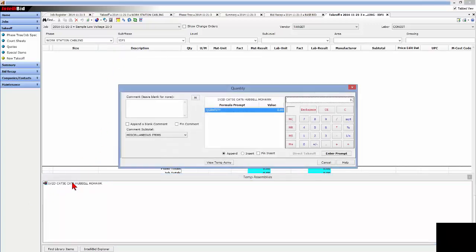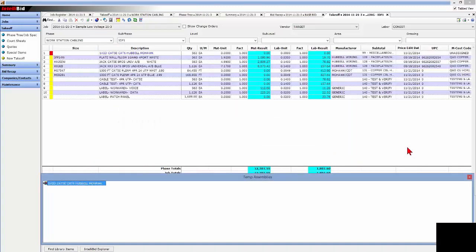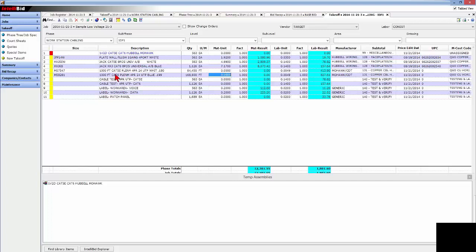So now, when I've got this catalog with my first assembly built right on the fly for IDF number 1, select the quantity. Maybe there's that 563 that I mentioned earlier, and taking all those parts off, and all the quantities have been multiplied out. Now there is with the material that's presently in the database, and it looks like the cable pricing is missing here on these two cables, but the extended material dollars and built-in labor units that extend out labor hours have been totaled down here at the bottom.